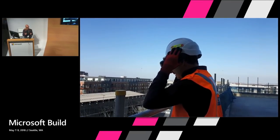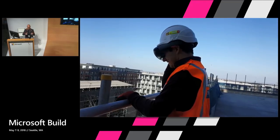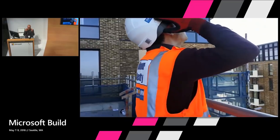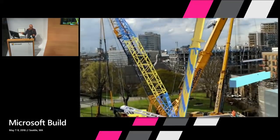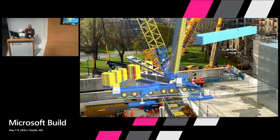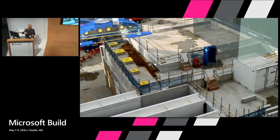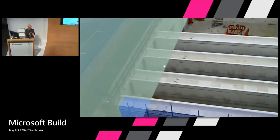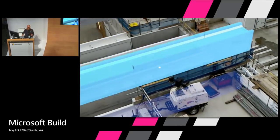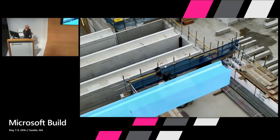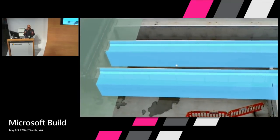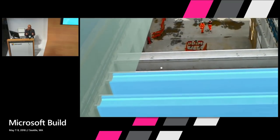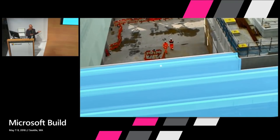If you're dealing with a use case where you just have to load a construction sequence one or two days in the future, that kind of geometry can actually fit onto the device. We've been doing a lot of work with customers to do a limited scope of model geometry aligning with physical space — taking the digital model, the animation, a one or two day look-ahead, and loading that into the HoloLens device. It actually works quite well for that use case. With a smaller subset of data and smaller geometry, you can actually load that into the HoloLens and have this type of experience.